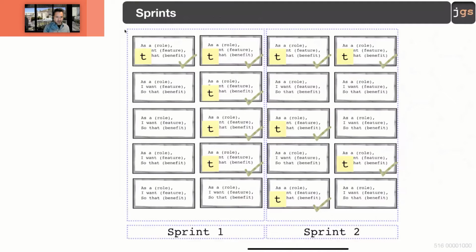Next step. You have your product backlog. You have all these requirements, all these items with priorities and estimation. Next step, we select which one we want to run in the sprint. Let's assume that you have only one sprint. I am going to ask you to do that. One sprint. So basically everything that you have in the product backlog should be moved forward to the sprint backlog.